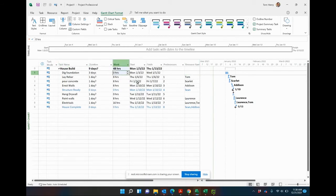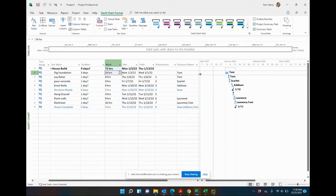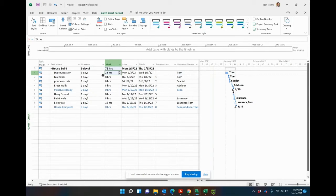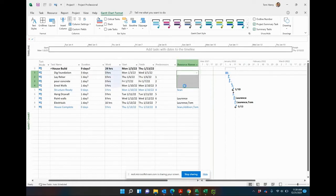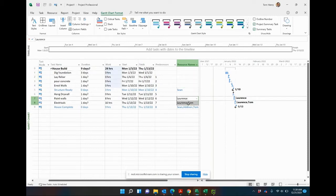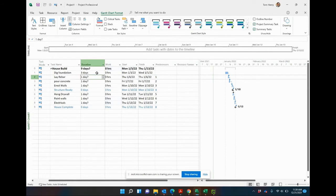That's because no one's working it, it's just a duration, there's no work going on. So when we add a resource, by default that resource is working full-time on that particular task, you can adjust that if you like. So the work is calculated at 24 hours. Now when you're going through and estimating, you probably want to be doing this before you've even come in and assigned your resources, right.